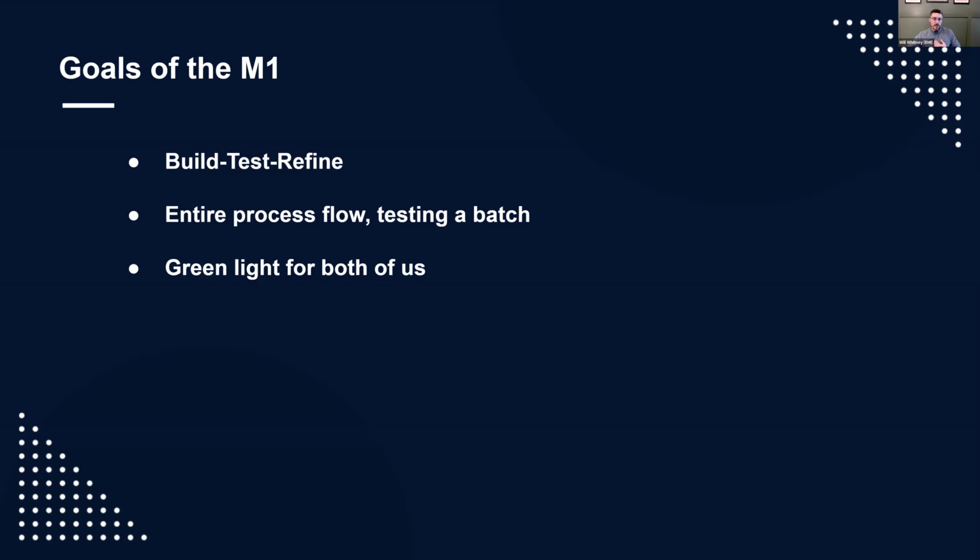Or we may find something that says, hey, you told me these were standard 100-foot length rolls that are simplex, just one image per frame, so like 2,500 images a roll. What you actually sent me were 215-foot rolls of film that are duplex, and these have like 10,000 images a roll. That would be something we would want to point out to you and discuss, because that could possibly change the scope of the project or the pricing or both. So we're finding things too. It's to help us see what we're working with and then chat with you about it, of course.